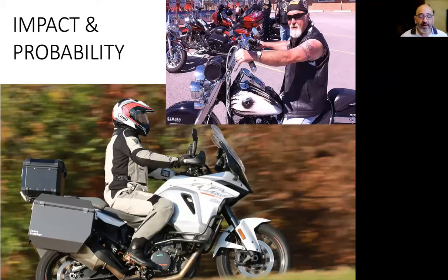Is it a proactive prevention or a reactive prevention? Proactive. So these crash bars reduce what, the impact of the accident or the probability of the accident? The impact of the accident. Exactly. So this specific risk response strategy works to mitigate the impact.